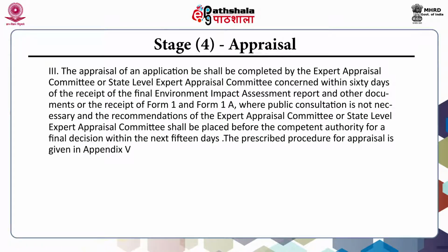The appraisal of an application shall be completed by the Expert Appraisal Committee or State Level Expert Appraisal Committee concerned within 60 days of the receipt of the final Environment Impact Assessment report and other documents, or receipt of Form 1 and Form 1A where public consultation is not necessary.